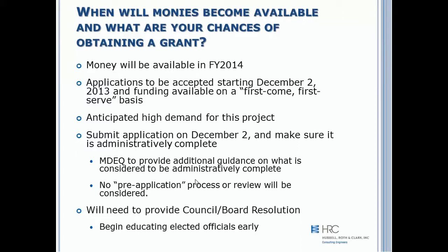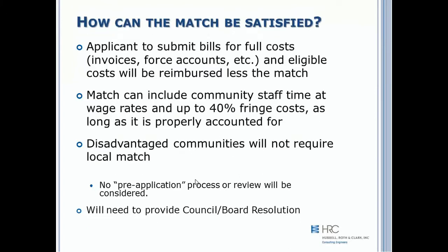The resolution acknowledges the commitments that the city or your municipality is making by submitting this grant application. In other words, if you're going for a planning design grant, you're committing to a project within 3 years. If you're submitting for a SAW wastewater asset management plan, you're committing to funding the program within 3 years. So it behooves you to begin to educate your elected officials.